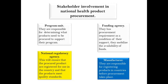Stakeholder Involvement in National Health Product Procurement: The Program Unit is responsible for determining what products need to be procured to support their program. The National Regulatory Agency ensures that procured products are registered for use in the country and meet quality standards. The Funding Agency has procurement requirements as a condition of their support and mobilizes the availability of funds. The Manufacturer is responsible for registering products in countries before procurement takes place.